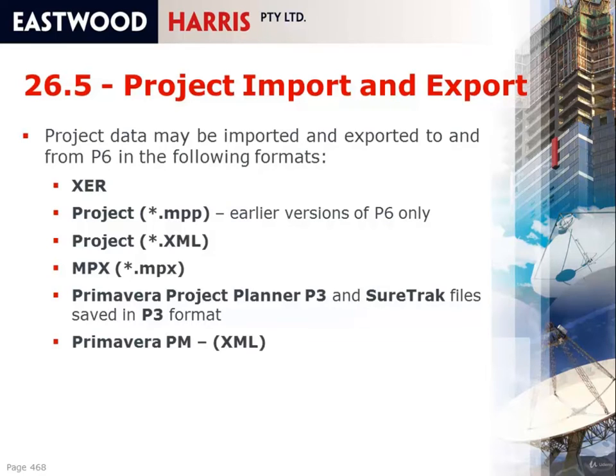The later version of Primavera import and export file is XML. 8.3 now supports multiple projects, so you can import and export multiple projects with an XML format into both P6 web and also the Windows client, whereas the XER cannot be imported into the web client. Also, Project XML can be imported into a Windows client as well.